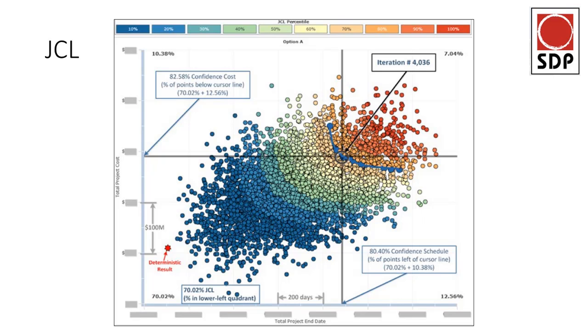When I say level 3, it's if the risks that have been identified, whether project specific or systemic, warrant it in a particular work package, we need to drill it down to a lower level, then let's do that. Let's keep the network logic going, because obviously that's where your network logic comes from. I've also been at this around 15 years, and I've yet to come across a project manager who, at the end of my 2 or 3 days where they sweated blood to get their schedule in a logical format, where the network makes sense to the planner and to the scheduler,